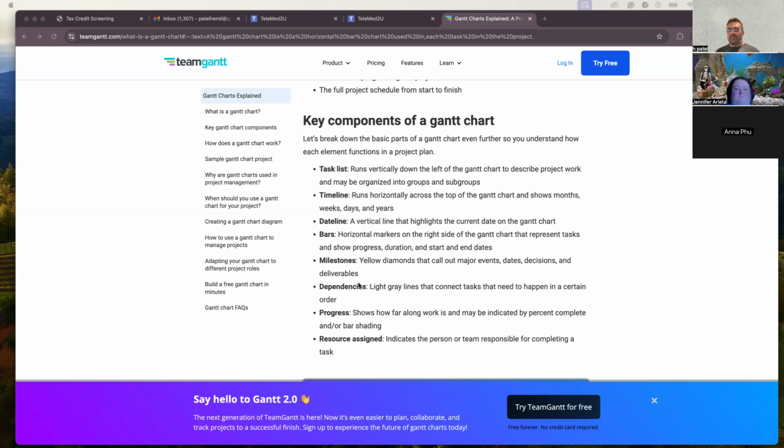Then you need to have labeling and shipping and things like that, right? So you cannot do that until you produce those t-shirts, right? But you can buy boxes, for example, buy stamps, things like that, without, so there's no dependency on making the t-shirts, right? So there are some tasks that don't require other tasks to be finished, right? And then there are some tasks that are dependent on other tasks, right? So that's our dependency.